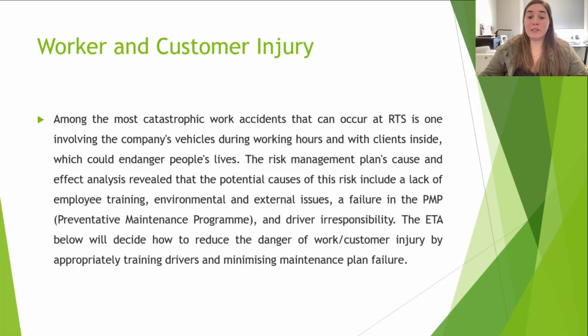In the risk management plan, we did a cause and effect analysis, and we got the potential causes of these risks. In this technology report, we are going to work with the failure of the PMP and the lack of training of the drivers. So after identifying the potential risks, we did an event tree analysis to think about potential risk controls.